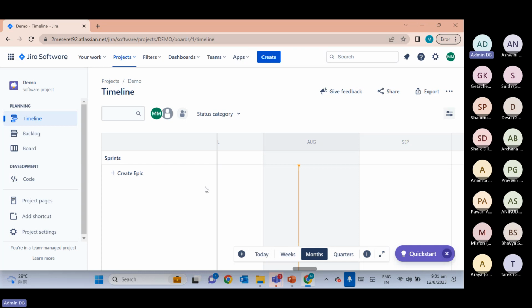He knows how many APIs we need, how many system APIs, how many process APIs, and how much effort we need. Do we have an existing RAML, or do we need to create a new RAML? Is this an enhancement of an existing API, or do we need to create a new API? In that case, the business story will be created from the business side, the technical story will be created on the lead side, and then the Scrum Master will decide in which sprint that story should be delivered, since he is responsible for all this kind of coordination.